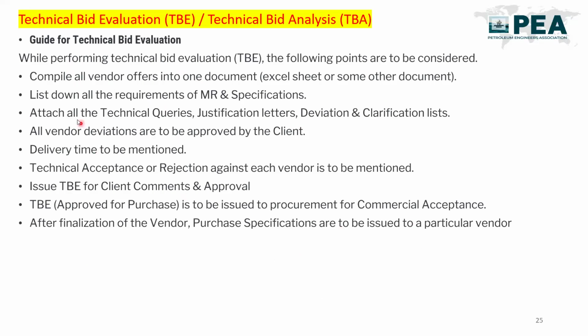Okay, so based on all the vendor offerings, we will compile all those reports as per MR, and we will attach the technical query justification letter and deviation clarification which is given by the vendor. Okay, any deviation taken will be given by the vendor. Delivery time should be mentioned in the technical bid evaluation report, like in how many days the vendor will give this material. Any technical acceptance or rejection by the vendor should be attached with the technical bid report.